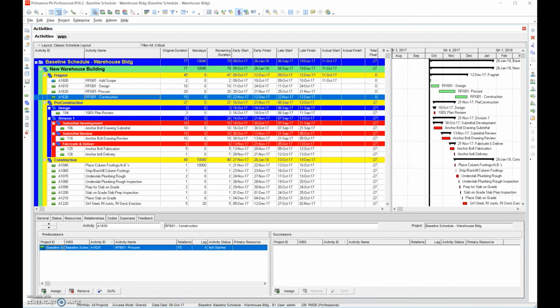And we may not know all the individual items, but we got to guesstimate it, and that comes into negotiating the change. So it's not necessarily 100% clear. So we take the latest schedule update, and we use that as our Fragnet schedule. We note the negative float on our contract completion date, or the very last activity, which is usually the contract completion date. We create a work breakdown structure for the Fragnet. We add activities into that Fragnet when we put durations, logics, and we assign calendars.